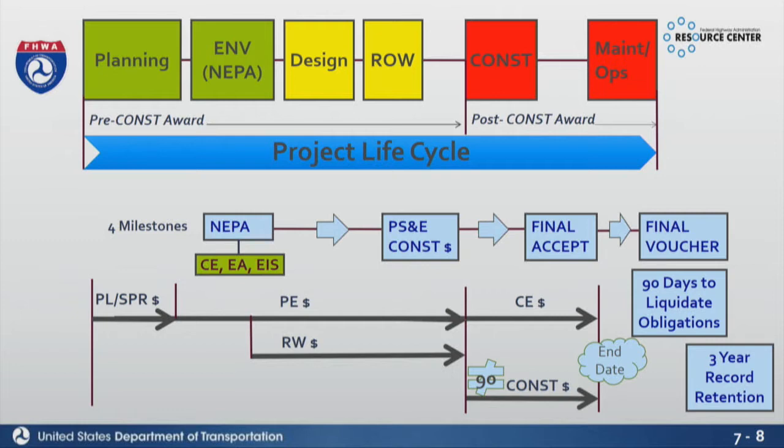That's going to be our first approval area. You know, we do have an authorization to do design, but the first milestone is going to be that NEPA determination. Now, we've delegated that to most of the states. You guys have assumed that responsibility, so you do the NEPA. You usually will review and make that determination and then decide to move into construction, or maybe the NEPA determination makes you decide not to do construction at all, and that's okay.